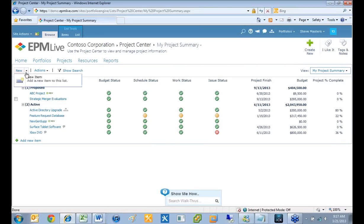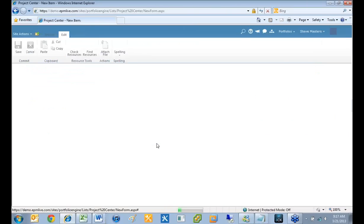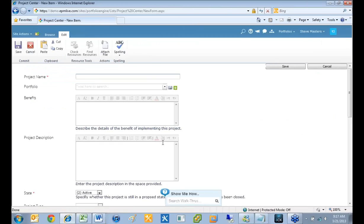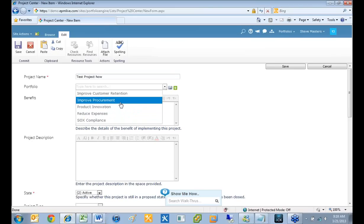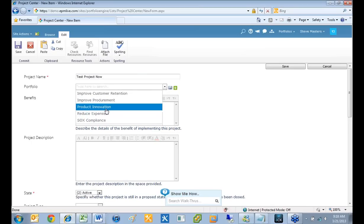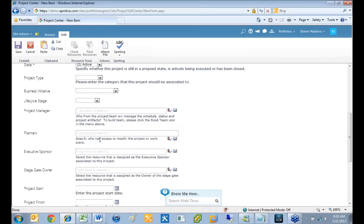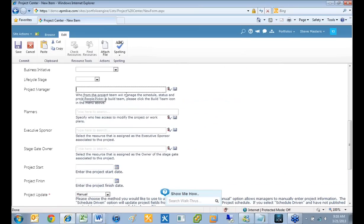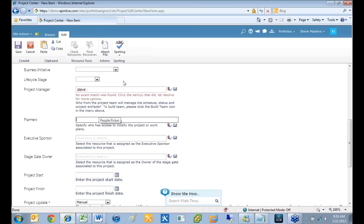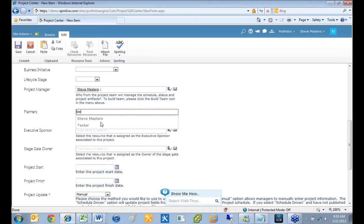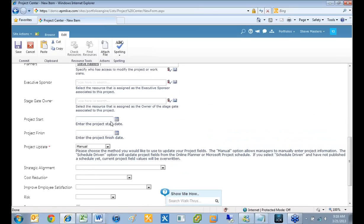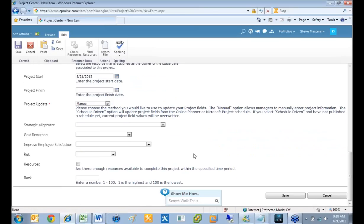The first tool we'll look at is the resource planner, but before I do that I'm going to create a brand new project. This would be how someone would put in a proposed portfolio item or proposed project into the system. I'll call this 'test project now.' When you do this, you choose a portfolio — this is how it knows to roll that data up to that portfolio. As we start to execute this project and put in budgets and things like that, it will all roll up to that portfolio automatically. I'll make myself the project manager and the planner, and give it an estimated start date.